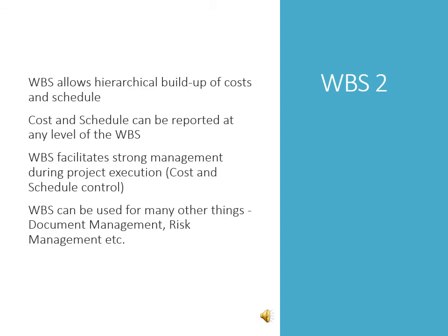The work breakdown structure allows hierarchical build-up of costs and schedule. Cost and schedule can be reported at any level of the work breakdown structure. The work breakdown structure facilitates strong management during project execution, with costs and schedule kept under proper control. It can also be used for many other things like document management and risk management, amongst others.